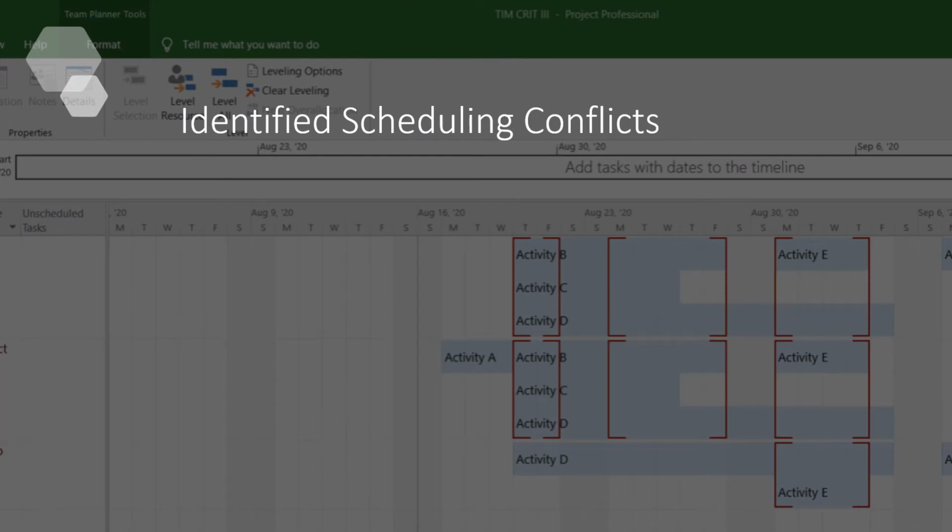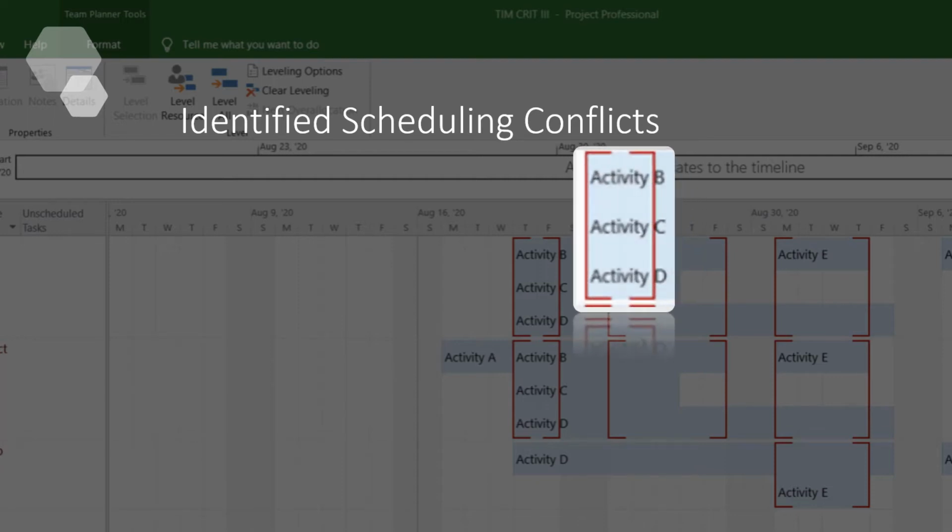Within Microsoft Project, right-click on the resource constraint icon, select Fix in Task Inspector, then select View Overallocated Resources within Team Planner. The following view will display. Within the Task Inspector, a visual of the resource that is overallocated will be presented within maroon brackets. For the remainder of this presentation, we will go over methods that resolve resource constraints.